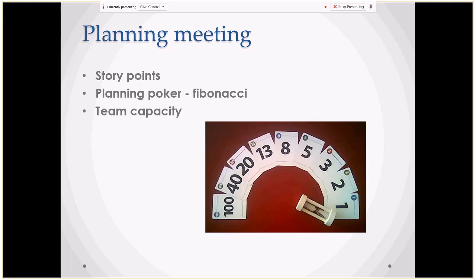In case they are different, we ask each member to give an explanation of why they chose 3 or why they chose 2. So he will explain. He might say the requirement wasn't clear to me, I don't have sufficient technical knowledge. So we consider it and then ask everyone to estimate again from the story point. So they will have a somewhat better idea than before.